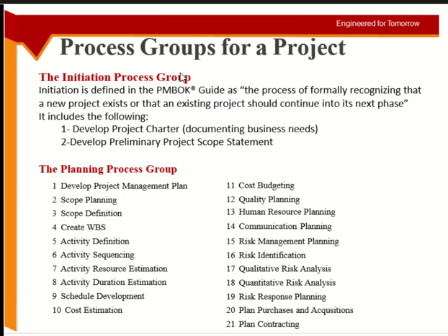Initiation involves developing a project charter, which is basically a business plan of the project, a document on what you will get out of this project. And developing the initial project scope statement: what is involved in the project, what is not involved. In the Busaitin highway project, for example, the scope for now was that we will have 2 intersections. What is not involved are the bridges, and so on and so forth.